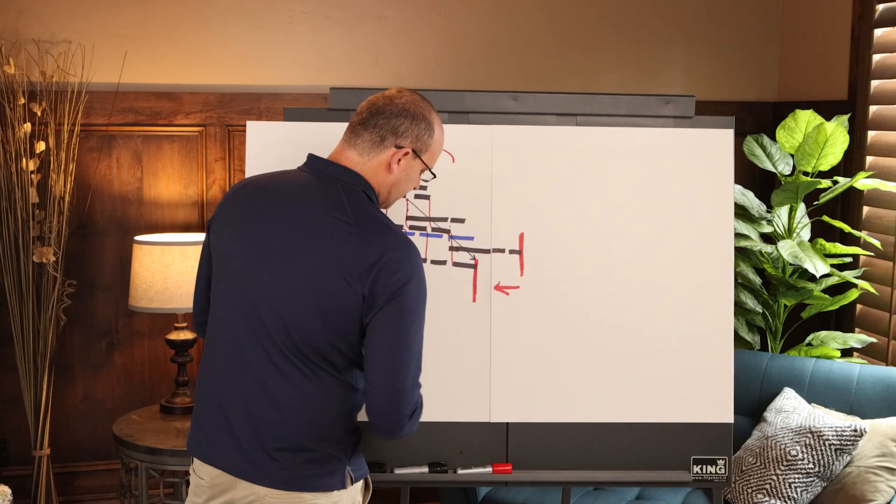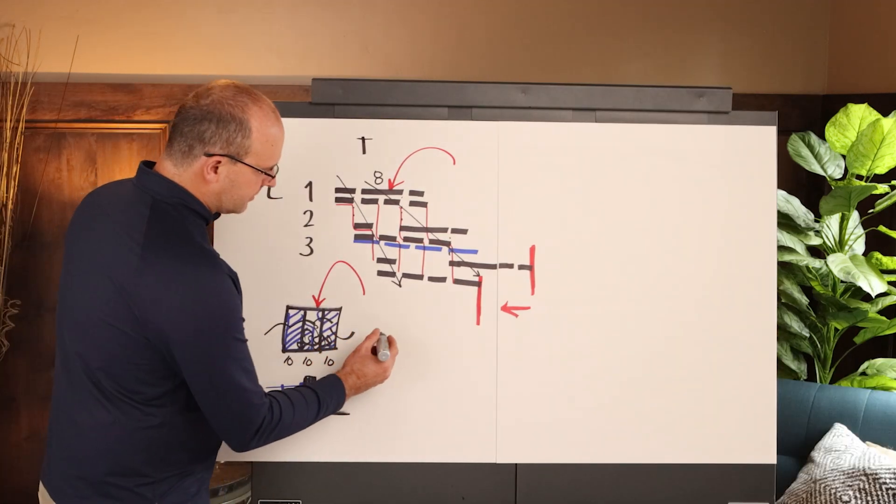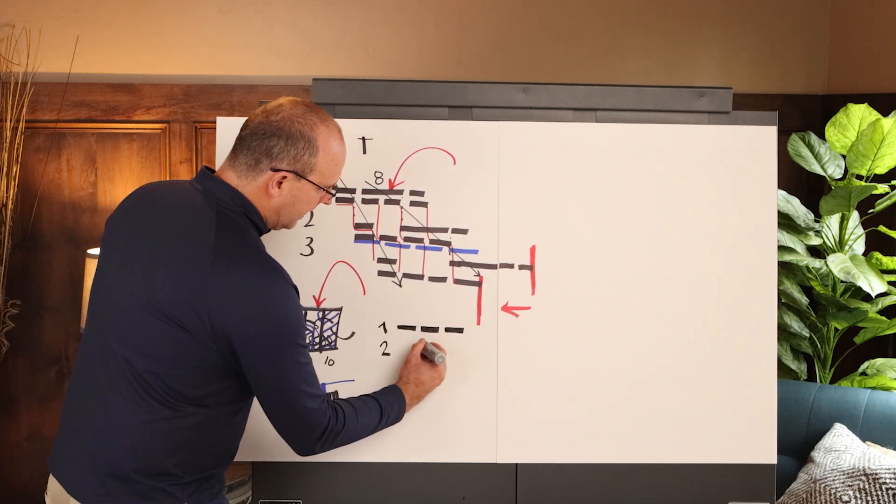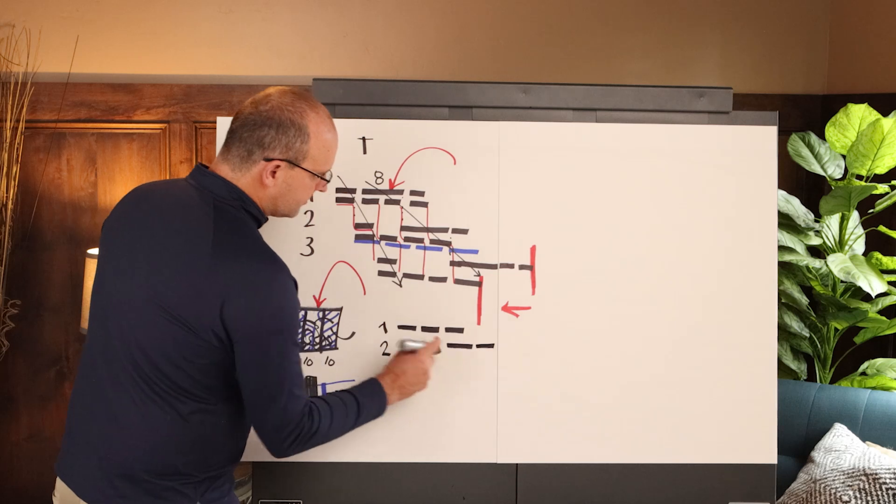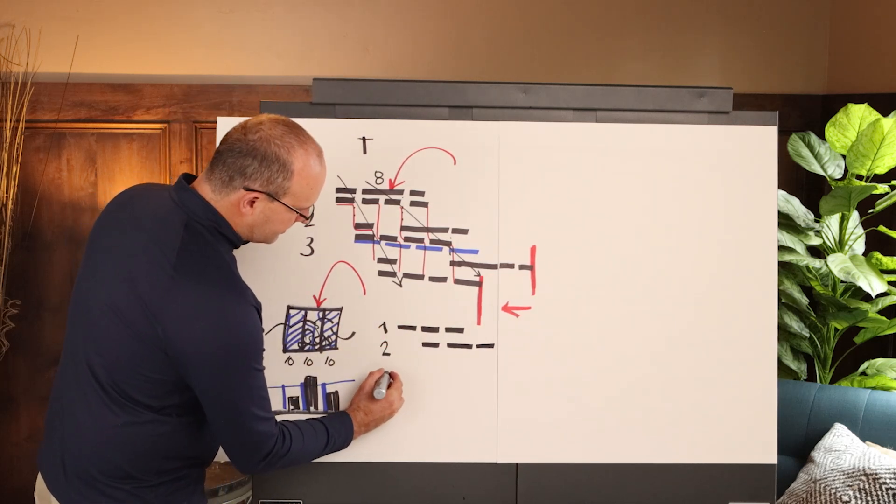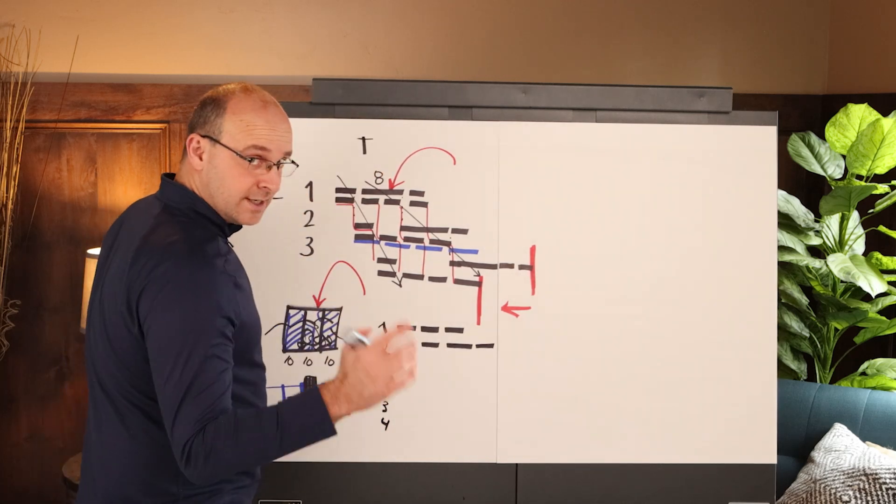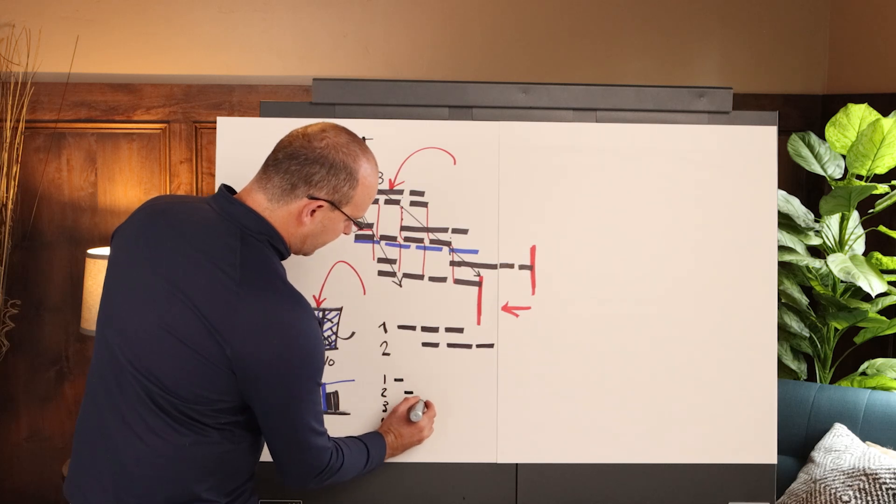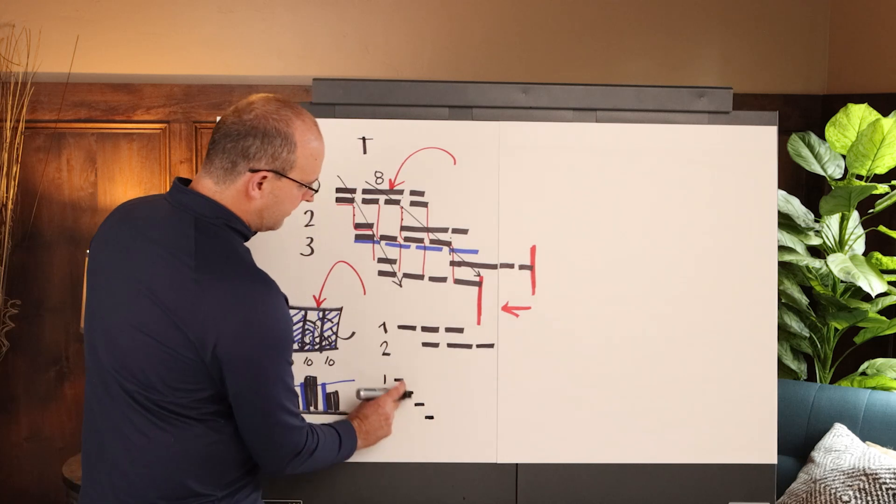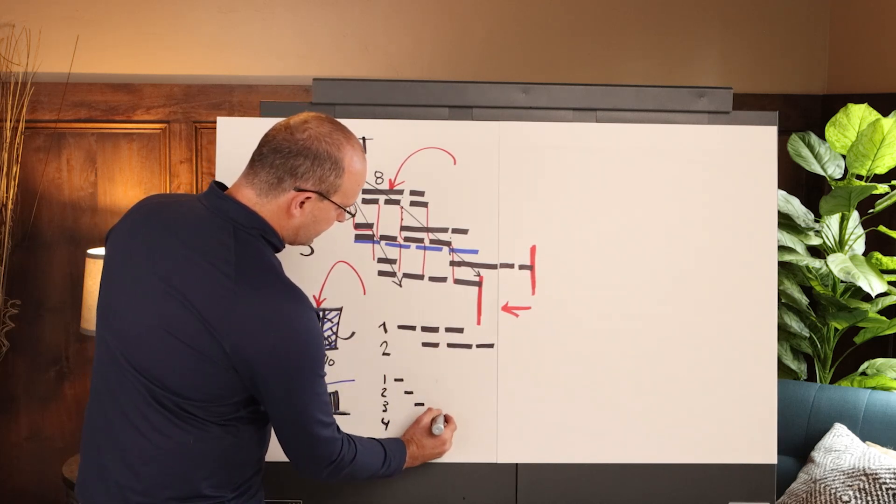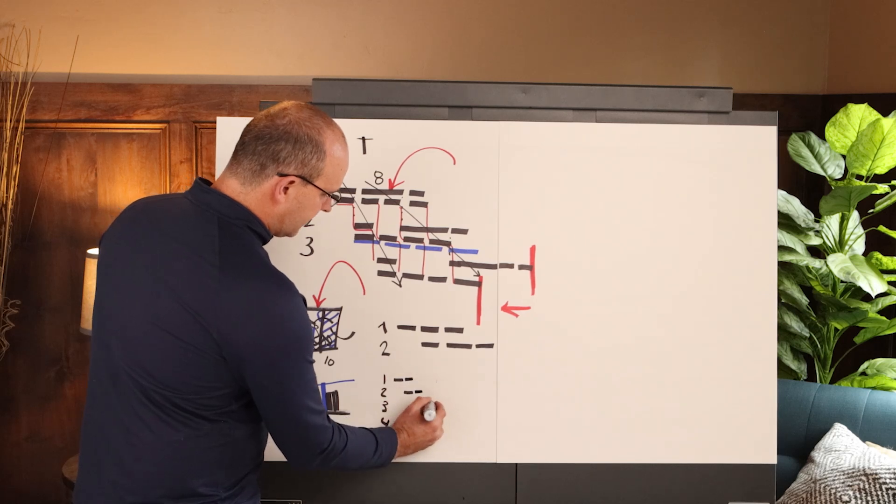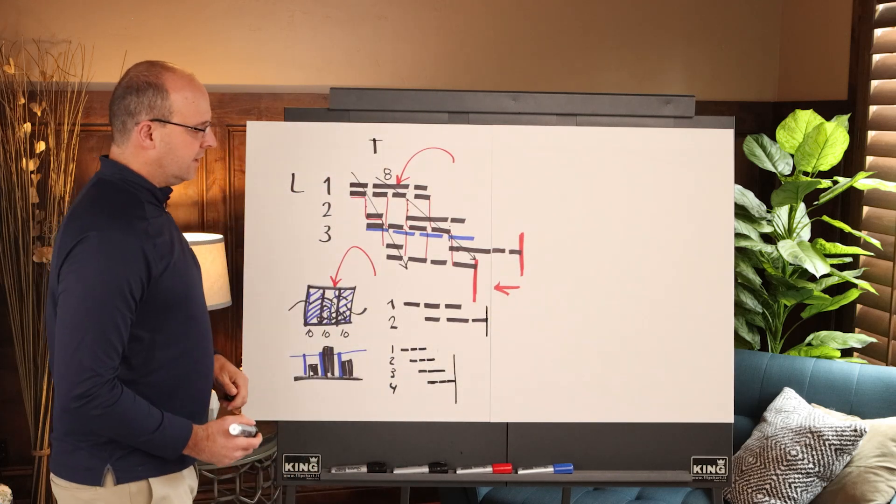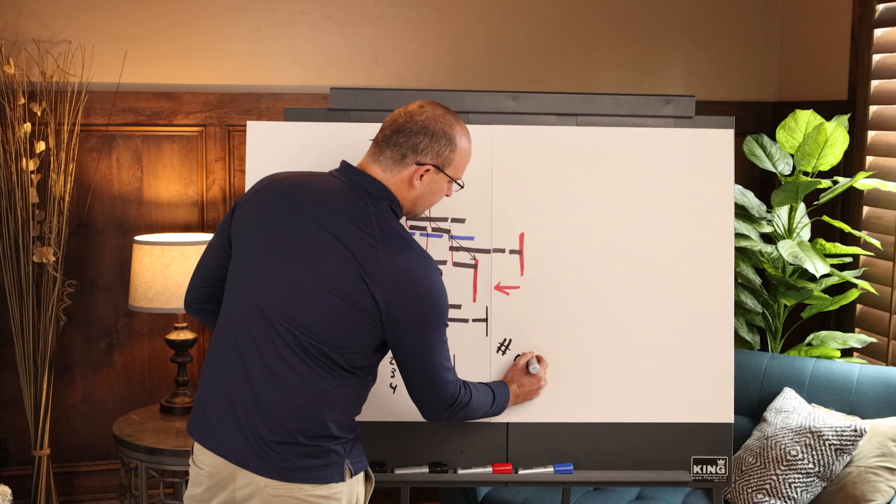The last thing that I want to say from a flow standpoint is that you can really do well when you're optimizing your schedules by looking at how many zones you have. So if you have zones one and two, and let's just take this for an example, and you have a normal tact plan with trades one, two, and three, and you say, hey, instead of two zones, I want one, two, three, four. And this is a really nice way to draw this. If you ever want to teach it, you just go ahead and draw half of that, and then half of that, and half of that, and half of that. And so what happens is that becomes your first trade, and you'll see that the end dates pretty much coincide. And then what happens is, as you start to scale this down, and you take these three, and you actually simulate it, you'll find out that the end date is much different. So the third thing you can have is the right number of zones.